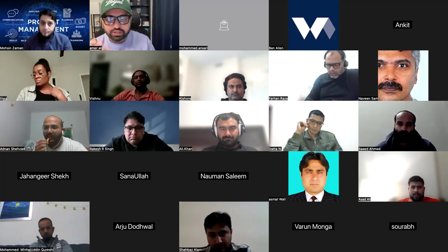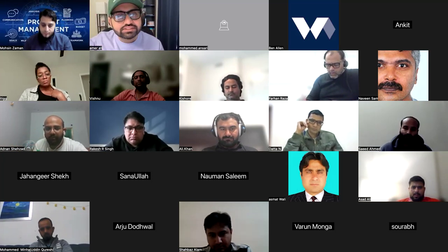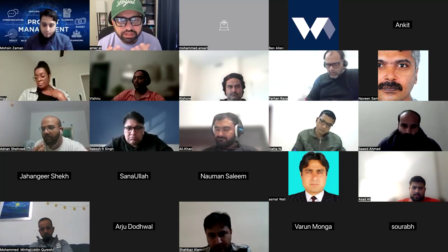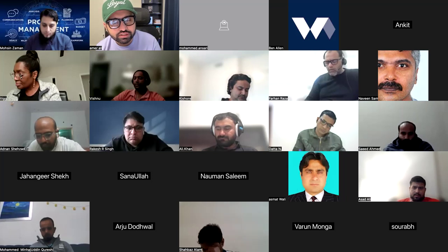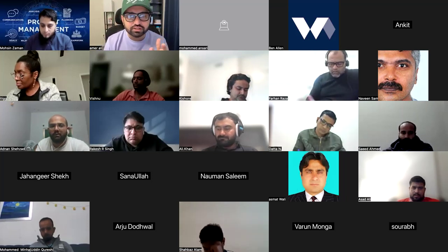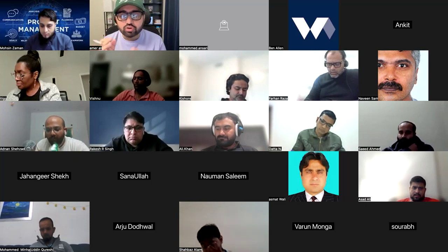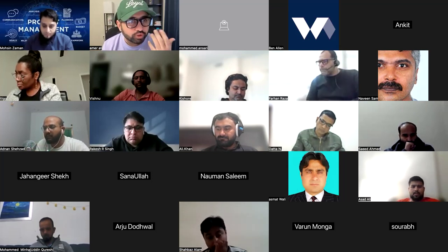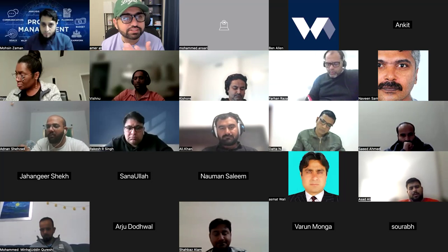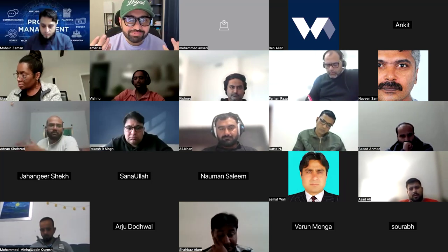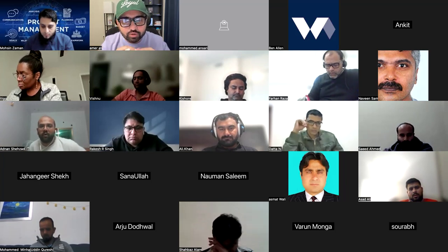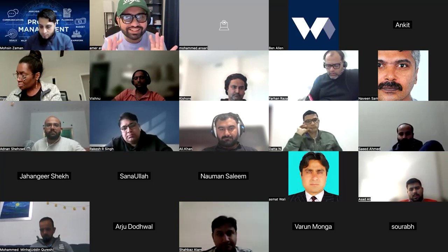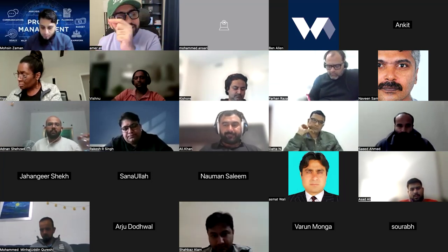Categorization. Whatever we do. Here, internal stakeholder, external stakeholder. Who can be internal stakeholder? Sponsor, team, etc. Who can be the external stakeholder? Customer, client, vendors, right? Who are the upward stakeholders? Those whom I report to, sponsor, program managers, etc. Who are downward stakeholders? My team. They are reporting to me. Who are sideward stakeholders? Functional manager, other project managers. Clear?